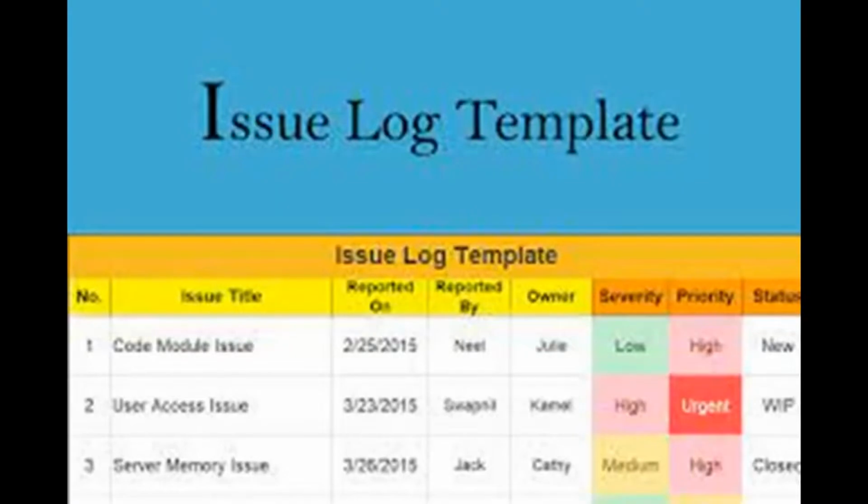Incorrect. Issue log. Throughout the life cycle of a project, the project manager will normally face problems, gaps, inconsistencies, or conflicts that occur unexpectedly and that require some action so they do not impact the project performance. The issue log is a project document where all the issues are recorded and tracked. Data on issues may include issue type, who raised the issue and when, description, priority, who is assigned to the issue, target resolution date, status, and final solution.